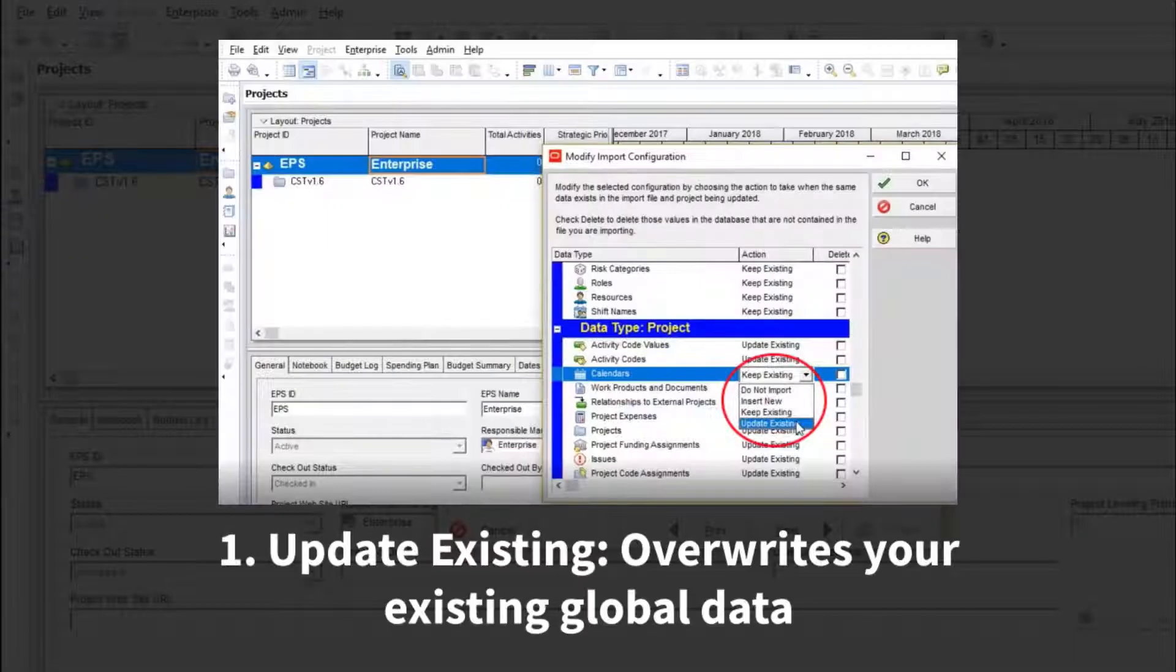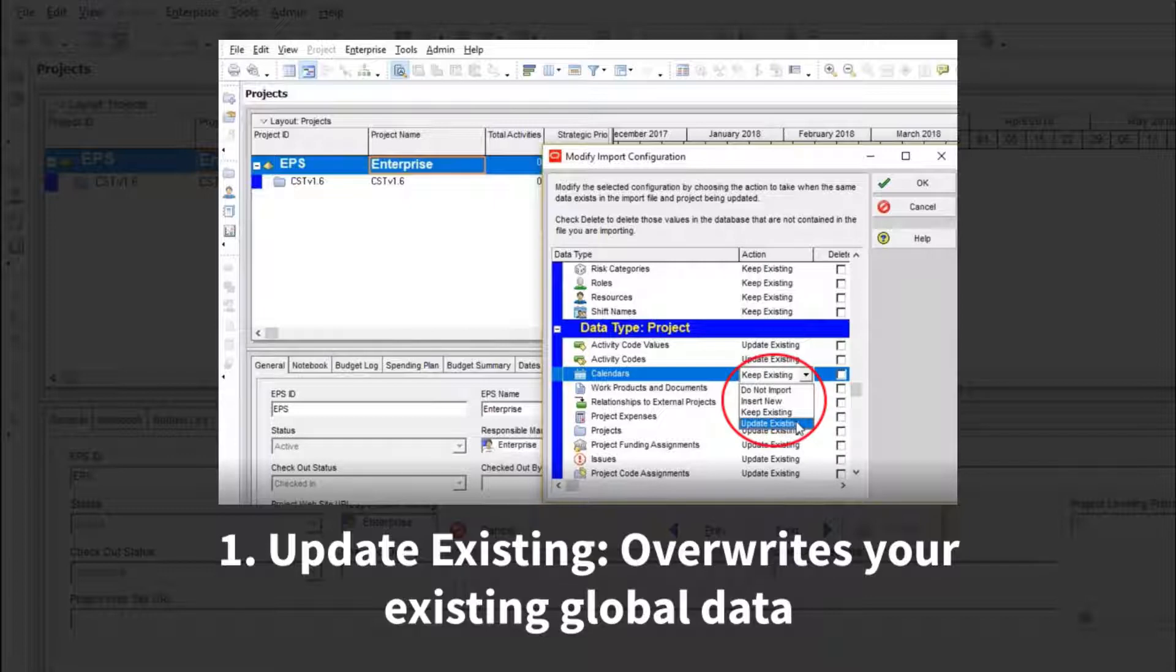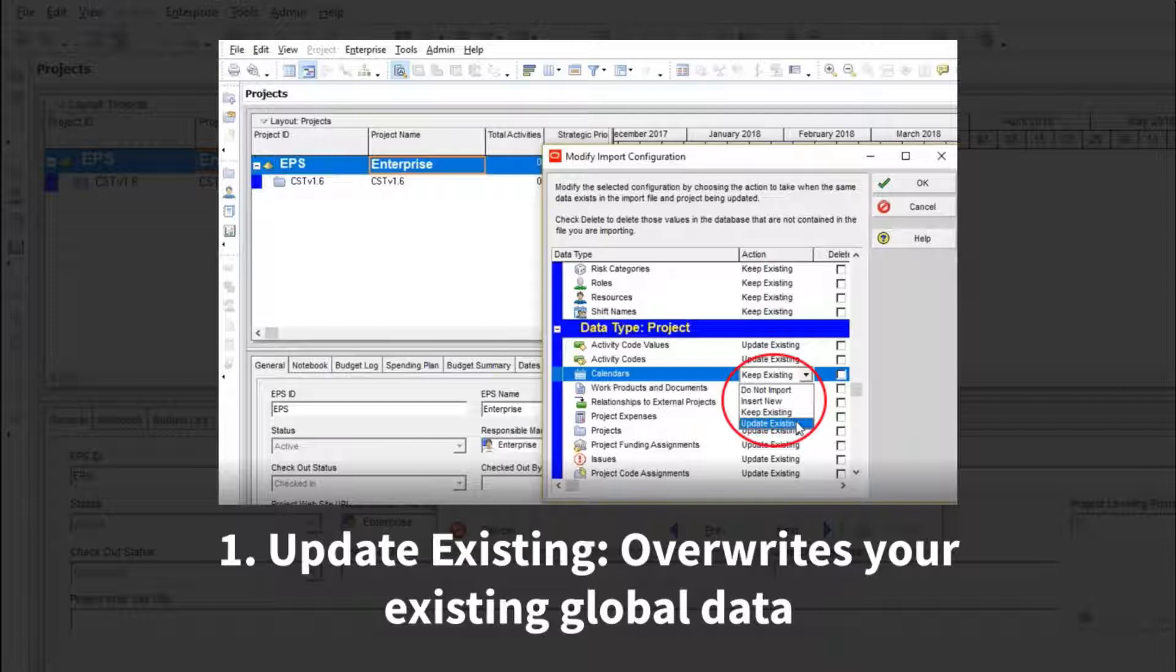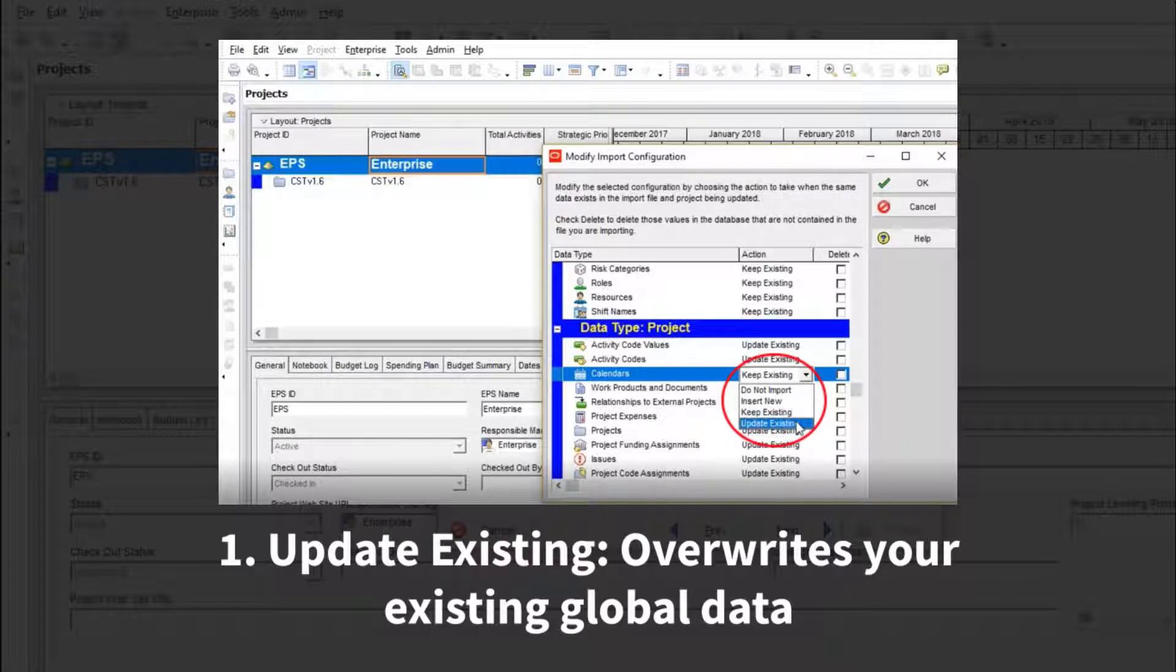Some of those options allow your existing data to be overwritten by the data in the imported schedule file. This can be bad as it could mean importing a schedule with different date settings on a global calendar could overwrite data in your database, affecting all projects in that database.